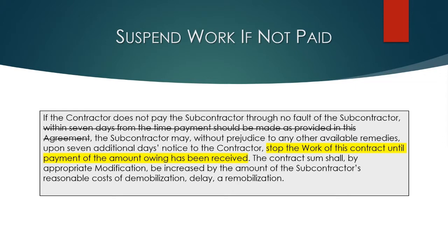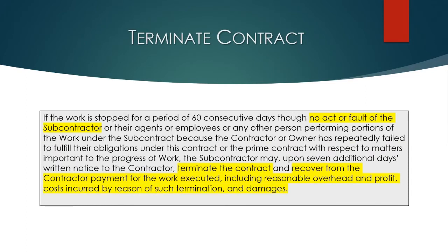Importantly here, the language that is stricken here has a line through it. That's problematic if you have a pay if paid provision. If your contract does have a pay if paid provision, you would want to remove that language, because if you have a pay if paid provision, arguably payment is not due. So within 7 days from the time payment should be made, that would not have occurred because payment should not have been made yet.